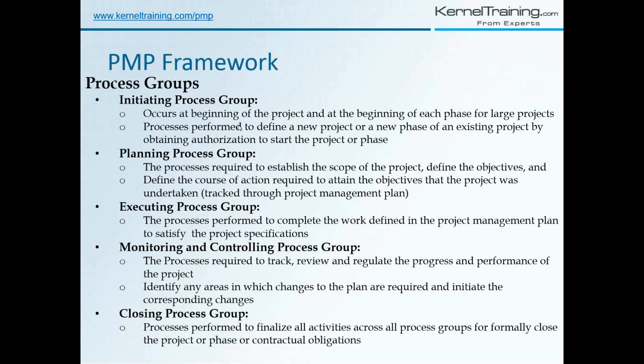That is initiating. So in initiating, there are inputs, but inputs are basically coming from maybe stakeholders, from the sponsor. Those inputs are SOW, business case, your agreements, all those are inputs to the project charter, and then you need to develop a project charter. As per PMBOK, project charter is a very, very important document. If you do not have a project charter, you are not authorized to assign resources on the project. You should not start the project. I mean, you should not start working on the project as a project manager. All right, you should say strictly no.